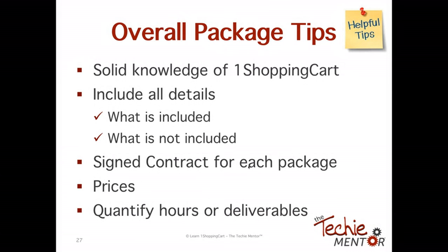So overall package tips, again, solid knowledge. And what I mean by solid is, if you're going to offer packages, make sure that you have a good comfort level with the package that you're offering, right? So you may have to stretch a little out of your comfort zone, and that's okay. Include all your details, what's included, what's not. Each package should have its own contract, prices, and a list of what's being delivered. Okay. Quantified though. You get up to 5 of this, up to 6 of that, up to 4 of this, and that way people have a very clear understanding of what they're getting and for what price.